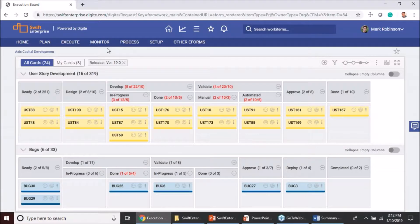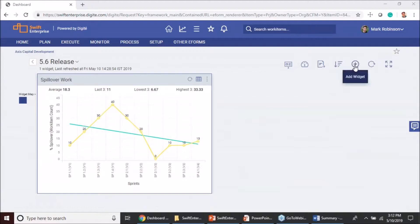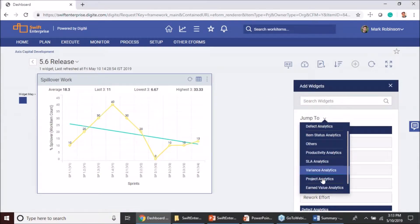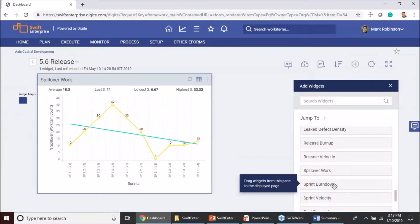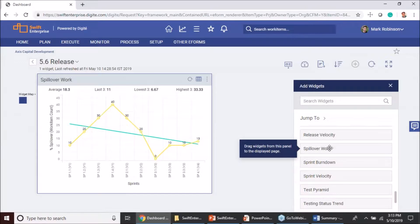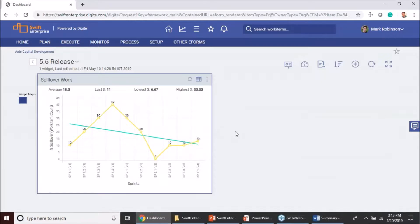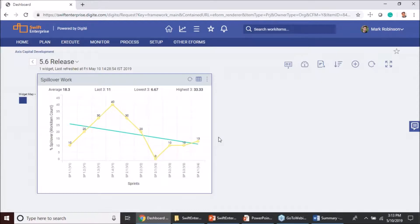Moving on to the next feature — the spillover widget. As part of the 5.6 version, you now have a new spillover work widget as part of the agile analytics available in your agile projects. You can simply drag and drop it and it will set up for the recent 12 sprints automatically. What I have here is I'm looking at the last 10 sprints, and what we are looking at is the amount of work that has been spilled over for each sprint. Clearly I can see there is a trend going up and then down and then slightly stabilizing.